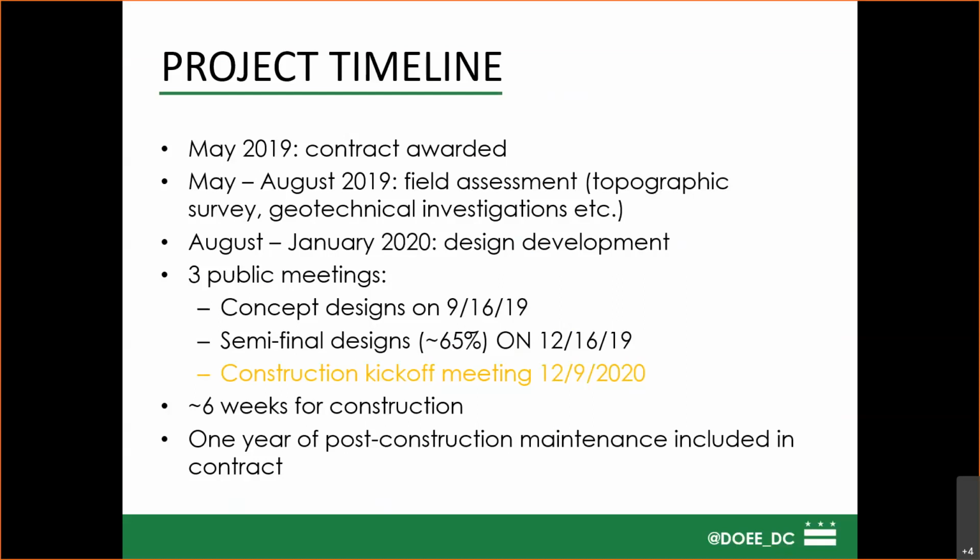Lauren and Chris, please note that Peter did ask that we keep our access road, our stabilized construction entrance, as far off the field as possible in consideration of spring baseball, since the grass is going to need to take root before it can be played on. We are walking that thin line between staying off the field and staying off the existing infrastructure. There's a number of yard inlets on the site that we're trying to avoid.